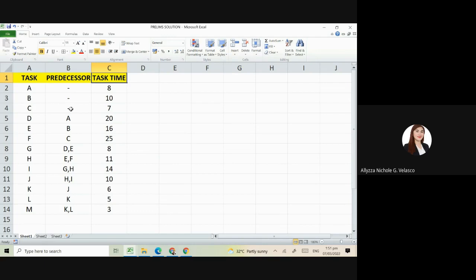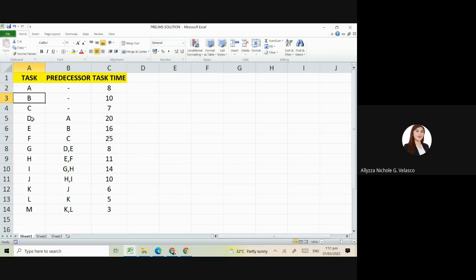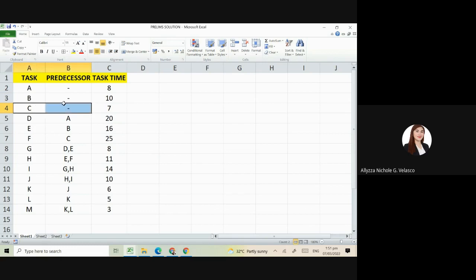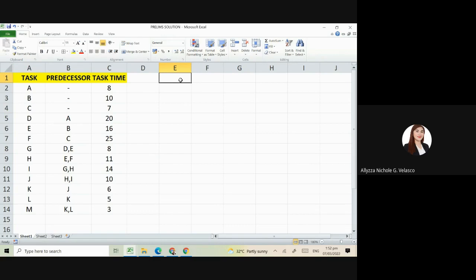For example, for task letter A, B, and C, as you can see, they have no immediate predecessors. So that means right from the start of the project, we can already do task A, B, and C, as long as you have the available manpower who will do this. They can be done simultaneously, or you can choose which one to prioritize first if you don't have enough manpower. Okay, so let's proceed on solving the critical path method using the precedence diagram.